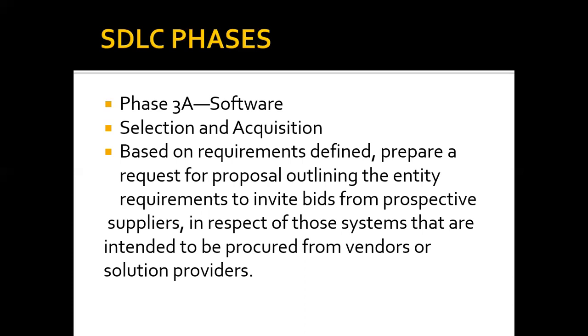So it's an accounting software we need. The vendor that has Sage is going to respond to the RFP. Somebody that has QuickBooks will respond to the RFP. Somebody that has maybe a locally developed accounting software will respond and show how your software modules or features can actually meet the requirements of that client. Once the responses to the RFP have been received, then the steering committee on the software acquisition can look at the responses and maybe select the best 3 or the best 4.